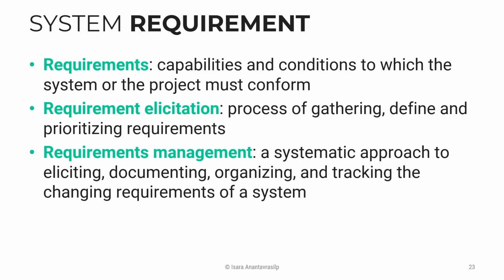It is super large, and there are going to be some requirements that people just don't know where they come from. You need to make sure that every time you write anything down in your documentation, maybe not in the lab and not for small projects, but in the large ones, you can trace back that this feature comes from this requirement, from that guy in that meeting, or this requirement comes from that requirement.